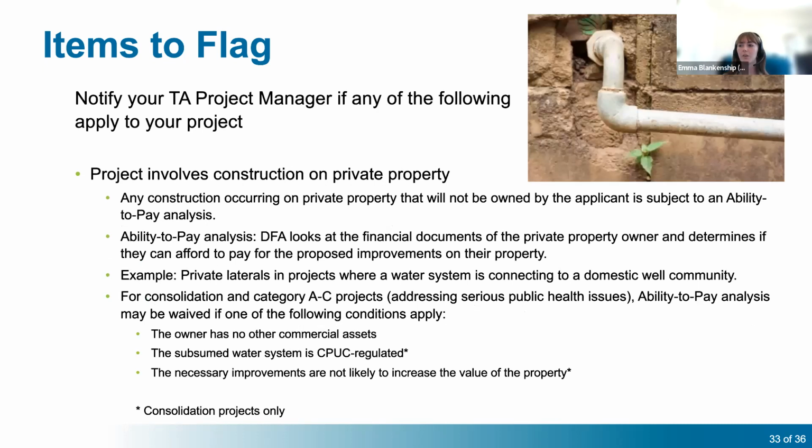Also, if your project involves any construction that's going to happen on private property and any infrastructure that will not be owned and operated by the applicant long-term, then this construction on private property is going to be subject to an ability to pay analysis. And that ability to pay analysis, basically DFA is going to look at the financial documents of the private property owner and determine if they can afford to pay for those improvements that are happening on their property.